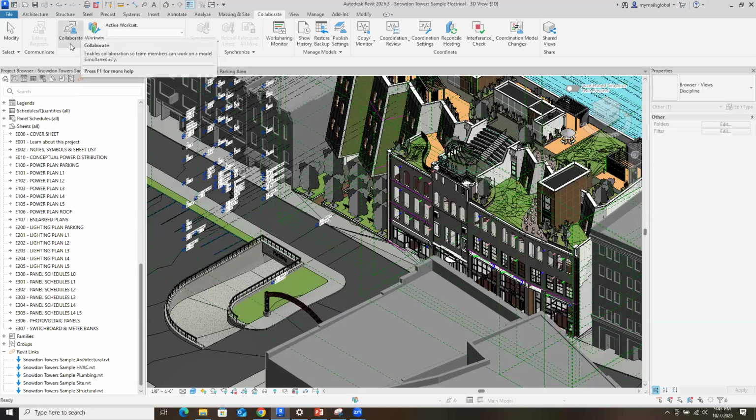Like if there are 4 floors, and each floor is divided into different work sets, then at that particular work set, that particular person can work. So we can break this particular building into different work sets. A work set is nothing but the component of the small part of that building, which is assigned to a particular person. Okay, so that is a work set.